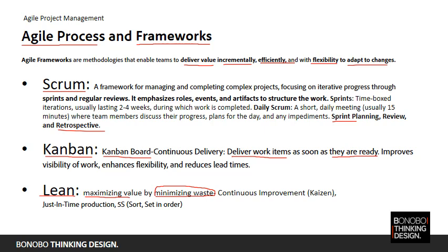All right, let's look quickly at the Scrum process. You can see that it has a certain flow. You start with business objectives, you do the alignment, you try to create a product backlog and manage that. Followed by that, there's a sprint plan, right? So what are the tasks or activities you're going to be covering as part of the sprint?